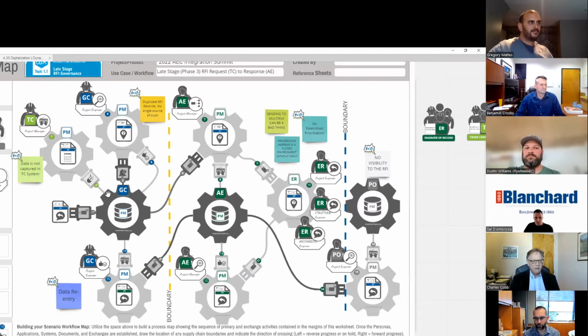And then once you bring it into the process here, it needs to synchronize up to the project engineer, who has to then go out and assign this thing to the right people, pushes it back into the system, which then connects to the AE system for that person to receive. And then they're going to start to assign out to folks internally to generate an answer.